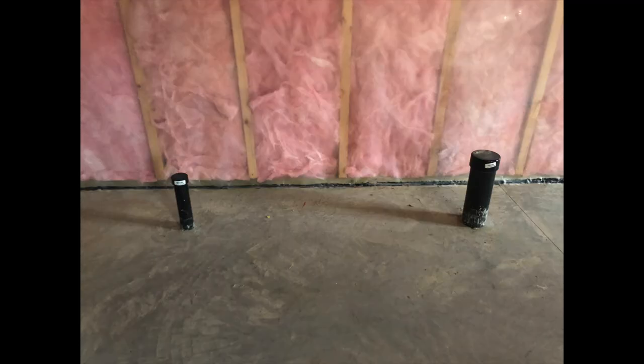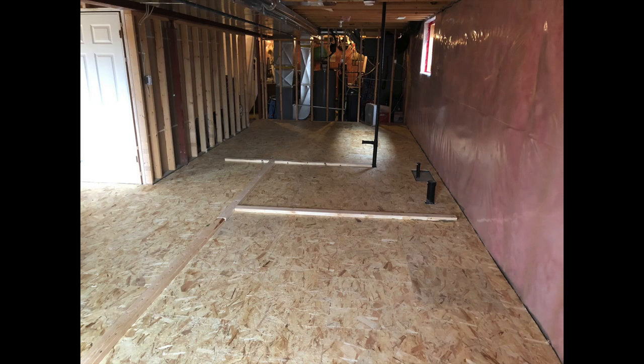Next would be bathroom. Do you have an existing bathroom rough-in, or are we smashing up the floor and putting one in? Where is the rough-in? Do you want to move it? Is the shower drain in a terrible place? I've had bathroom rough-ins where the shower drain is almost literally underneath the furnace. So we're smashing it up no matter what. We can't finish that. That's just a mess.